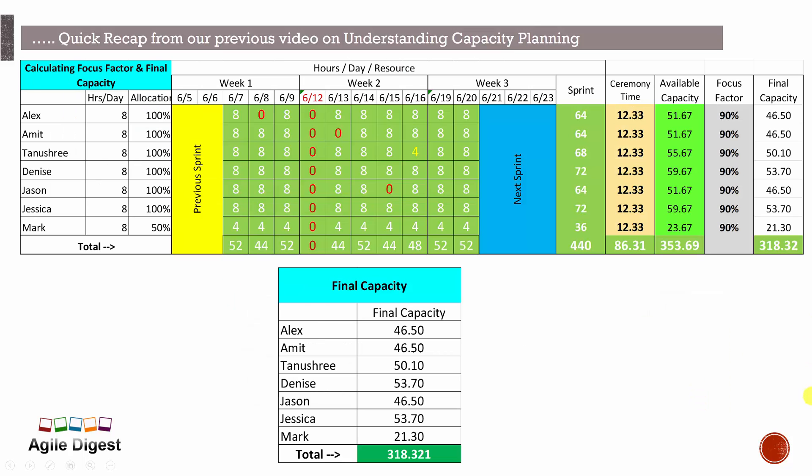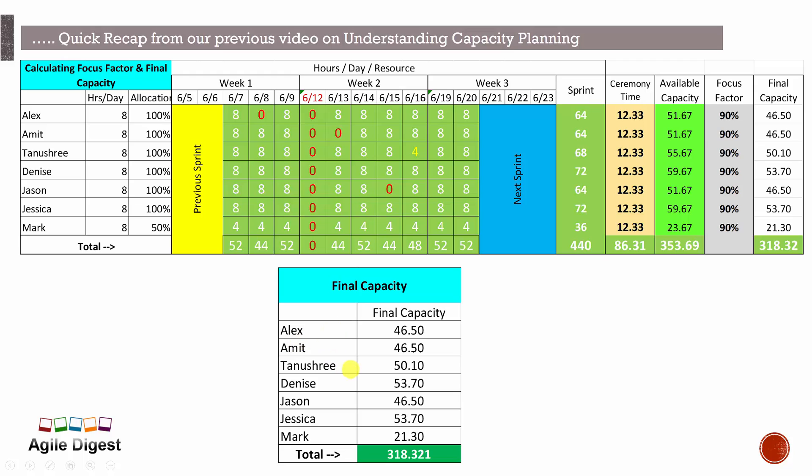And finally we'll be looking into the focus factor. If we take 90 percent of focus factor, then it will be coming to 46.50 for most of them, and few who didn't take a leave is 53.70. So total amount of hours for this team for this particular sprint that we are targeting for the capacity is 318.32 hours, and the final capacity for everyone is as below.